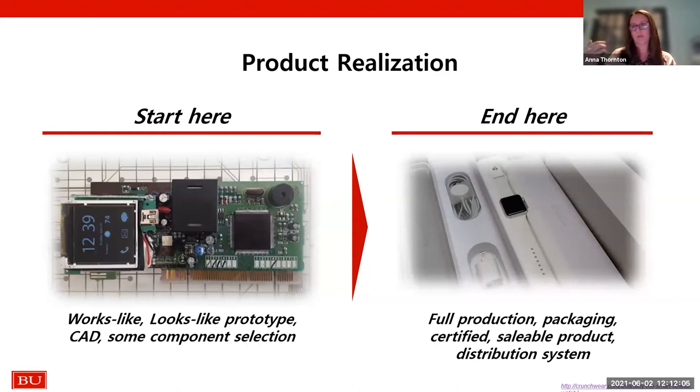Because what you don't want to do, which happens to a lot of the clients that I've worked with, is you start talking to factory and they go, oh yeah, we're ready to produce, but oh, by the way, we need your graphics for your startup guide for your to get FCC certification. And you go, what? Huh? FCC certification, startup guide, what is that? Why do I need that documentation? And that's when teams begin to scramble. They're usually at the last minute and you're having to generate this material and go and get these certifications or create this documentation at a time when you really don't have time to do that.